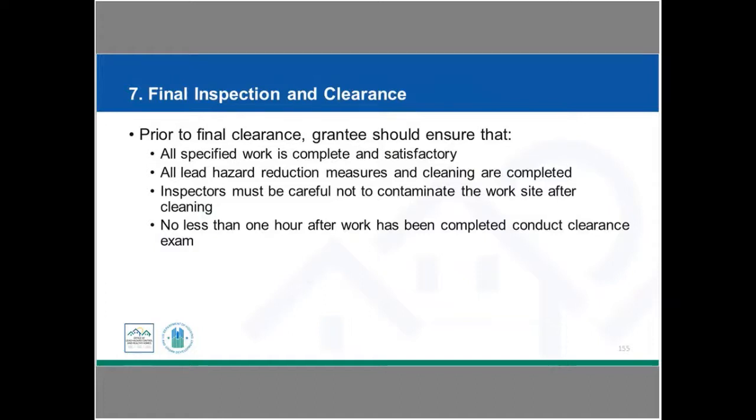So let's move on to step 7, which is then thinking about when the work has been completed, determining when it has been done acceptably, and not only when it's time for those occupants to be able to return to the site, but also when we're going to be willing to pay. So prior to our final clearance, the grantee is going to have to make sure that all of the work has been completed. When we talk about a clearance activity, we're having clearance testing done to make sure that the lead levels themselves are acceptable, but that does not go through and look at the scope of work and make sure that everything that was included in that has actually been completed and that it was done to the specifications that were required.